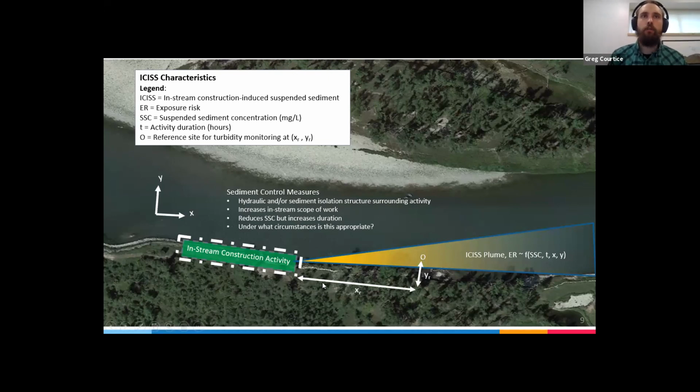So generally what we do is we implement sediment control measures around the activities, and this will hopefully reduce concentration. However, it comes at a cost of increasing the scope of work, increasing the release duration. So we have to ask the question, under what circumstances is this appropriate?